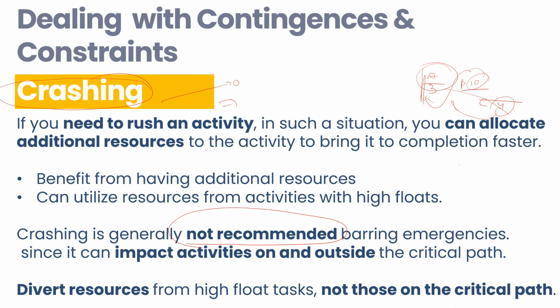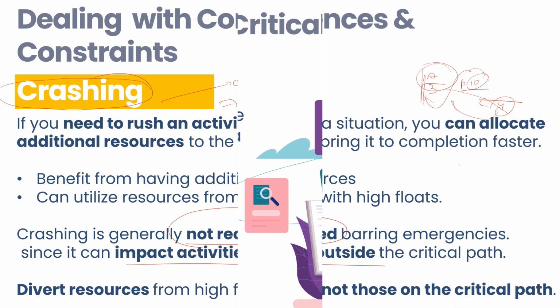Let's say your project completion is nearing and you are exposed to the LD. You need to focus on the completion of a particular activity at all costs so that you avoid the LD. In that case, you can go for the crashing technique, but only in extreme and emergency situations. Otherwise, in general, crashing is not recommended, because it impacts activities both critical and non-critical, meaning activities on the critical path as well as on the non-critical path, because it directly takes away resources from various activities.